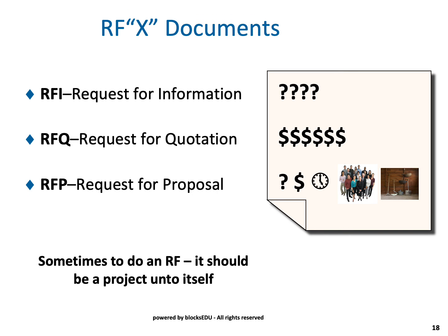The request for proposal is basically a document you create that's asking for someone to provide a product or service to you based on some criteria. And the evaluation criteria is spelled out for them, and the amount of points awarded for each one of those answers is also spelled out for them. And that's given off to individuals or organizations where they actually reply back to that.